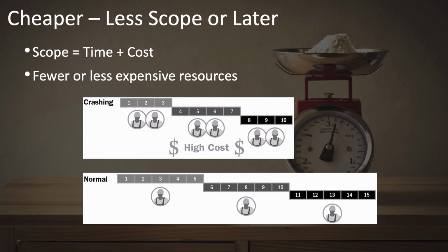Another option to reduce your resource expenses would be to outsource the work to other countries that have lower labor rates or lower taxes. However, be careful not to be deceived by the difference between labor rates and labor cost. Just because a certain resource costs less per hour doesn't mean it's going to cost less to get the job done. You may find someone who can get the job done for half the hourly rate, but if they take 4 times as long to finish it, you're not saving any money. Your costs are actually going up.